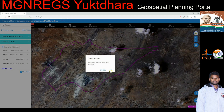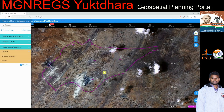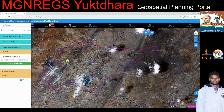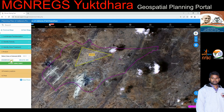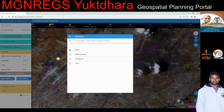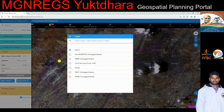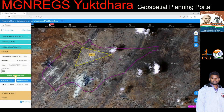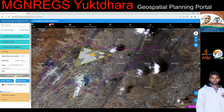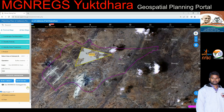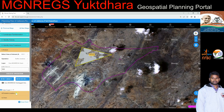After completing activity identification, the MSE user clicks to the next stage. Under identify area treatment, major functionalities available are analyze, probable locations, and draw. The user selects an area by drawing a polygon in the selected Panchayat area by clicking 'Draw AOI' (Area of Interest) on the map. After drawing the AOI, clicking the 'Start Analysis' button provides options to perform operations like buffer, intersection, or union on the selected AOI. The buffer operation allows users to select a particular layer and specify the buffer size in meters. The output layer is stored in the database and can be reused for further analysis in probable locations.